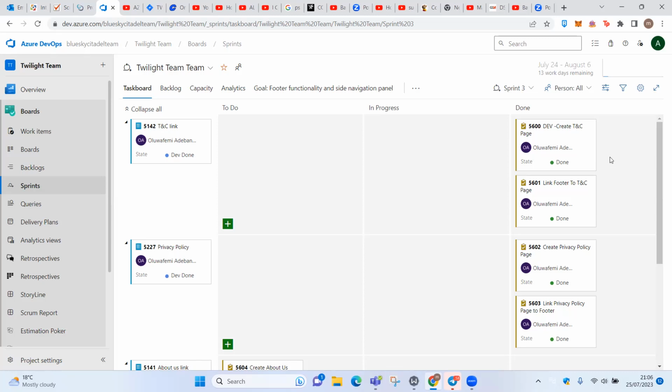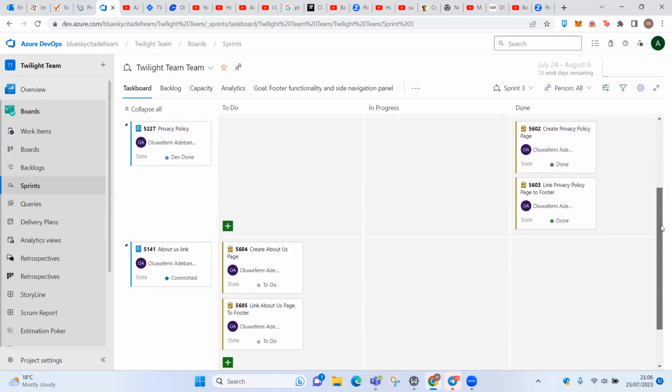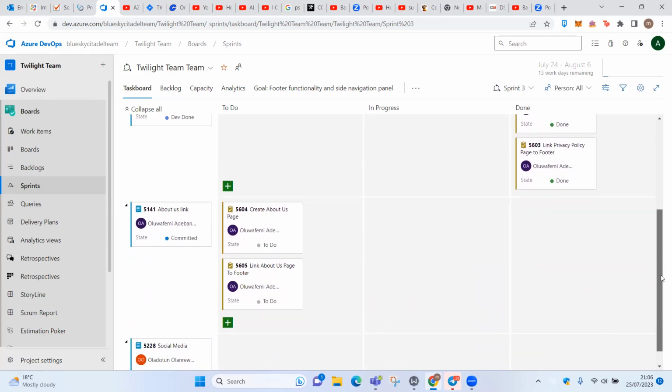All right, scroll down. Let's look at the other stories that you have. Those two in to do, do they belong to the developer also? Yes, Femi. Okay, so they've not been estimated in hours. That means there's every possibility that the ones he's taken to done were also not estimated in hours.